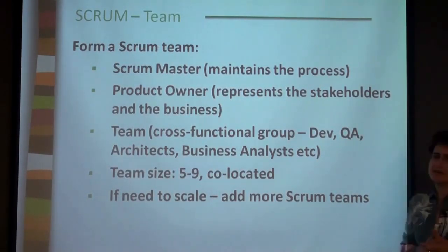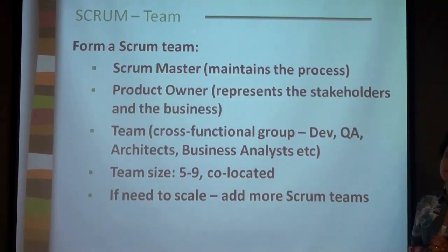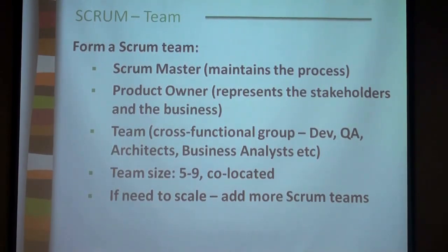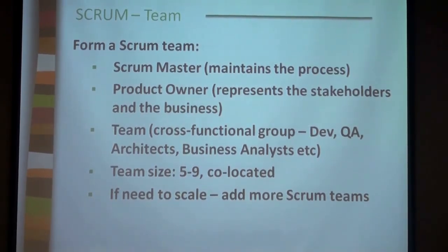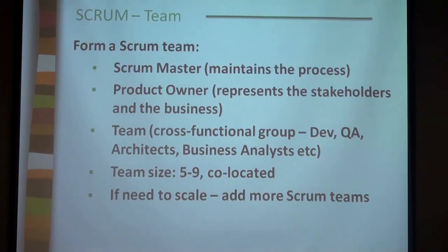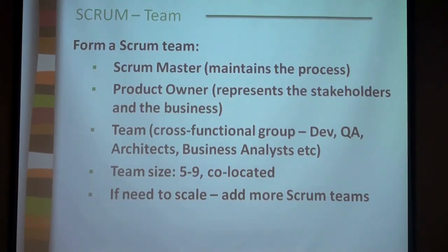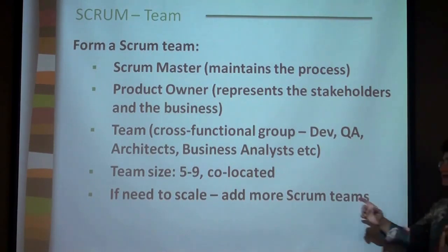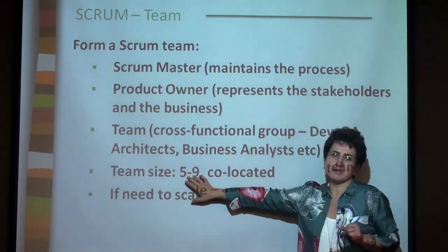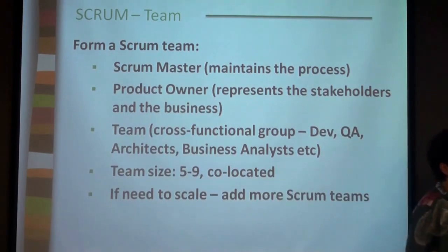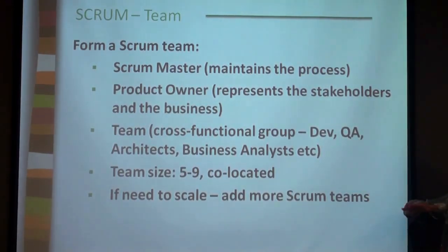How is Scrum done? It should start with a team. Without a reasonable team, without a good working team with efficient communications, you cannot be successful in Agile development, because Agile development in many aspects is about trusting the people you work with, right? So a Scrum team is usually sized between 5 and 9 people, because you have to have a few roles in the Scrum team.